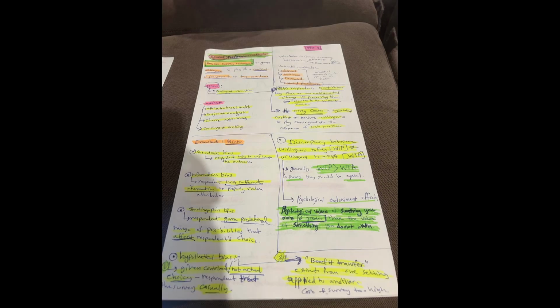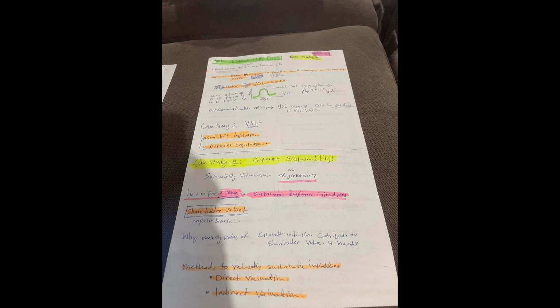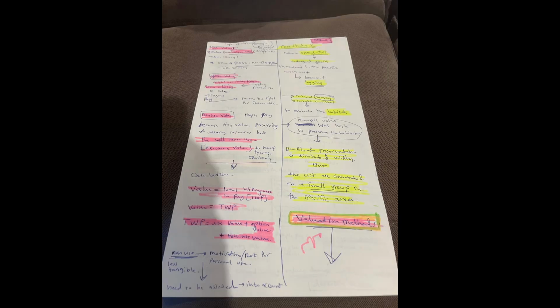And regular monitoring is key. The mantra is, avoid the risk if you can, mitigate it, transfer it, like with contracts or insurance, share it, or consciously accept it. Just hoping for the best is not a strategy. Insurance is one way to transfer risk. It is. You pay premiums to an insurer, and they cover certain large losses if they occur. But not all risks are insurable.